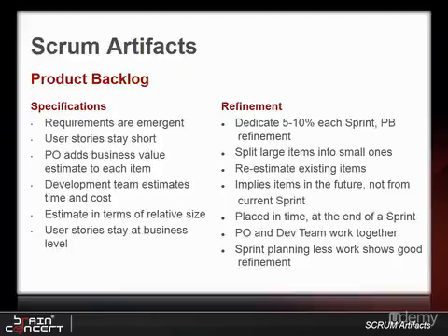First, requirements are emergent, meaning we don't and cannot know upfront every detail about what we want in a product. Therefore, the product backlog is a living document and requires constant grooming to keep it current and useful.